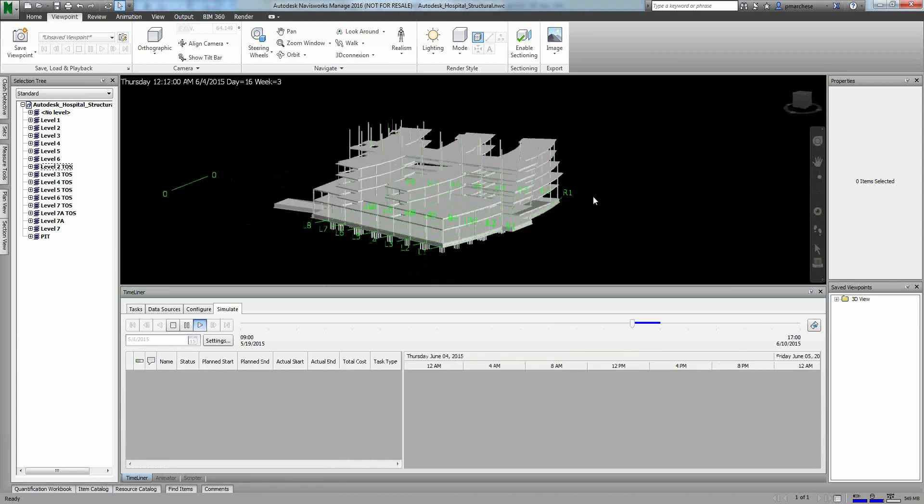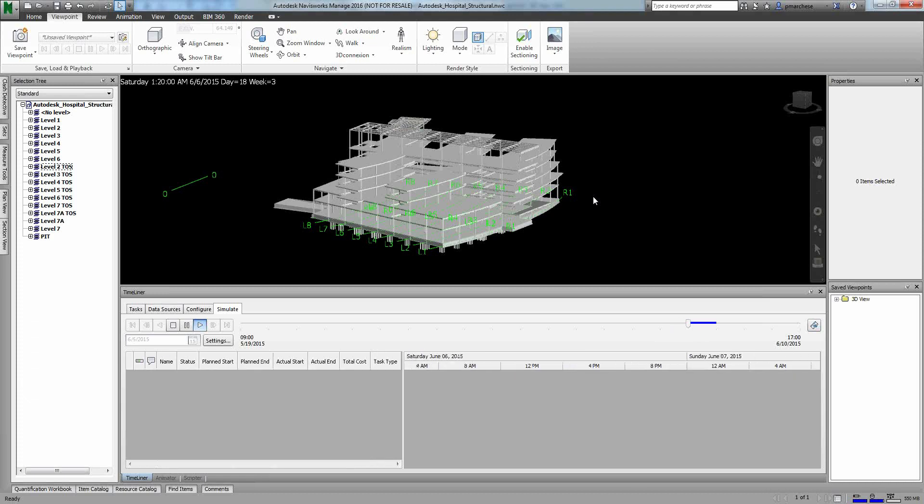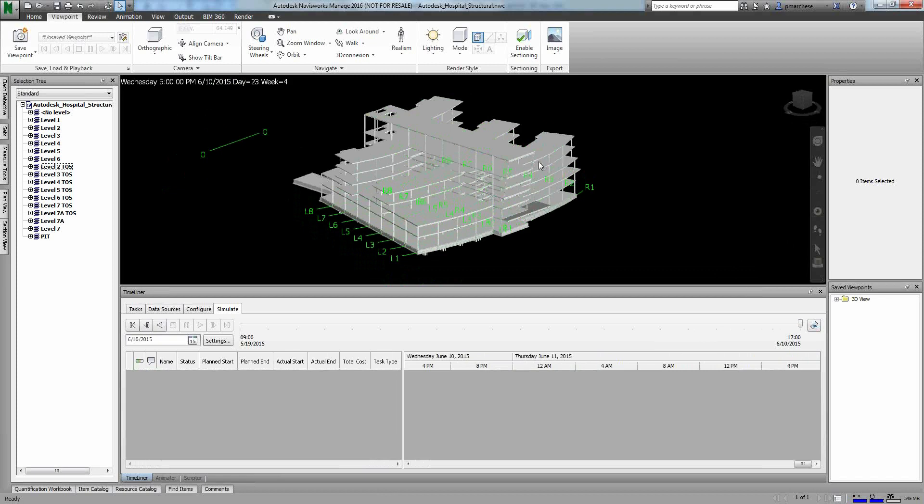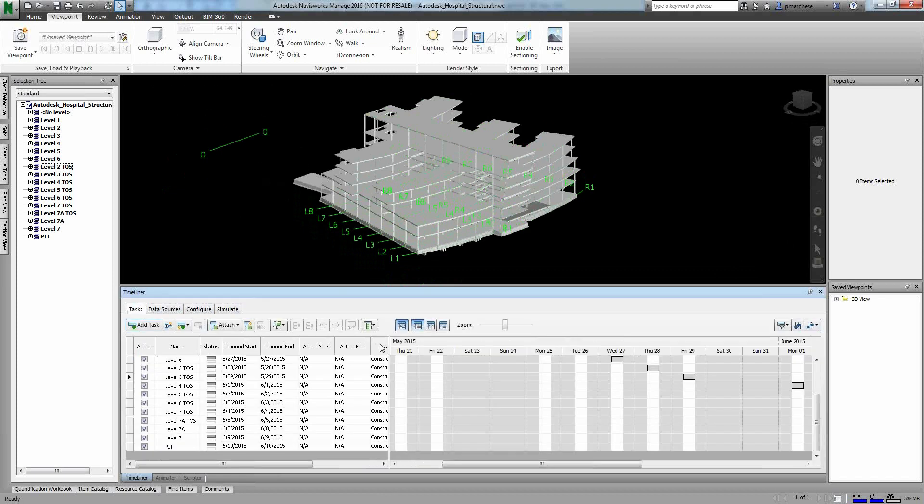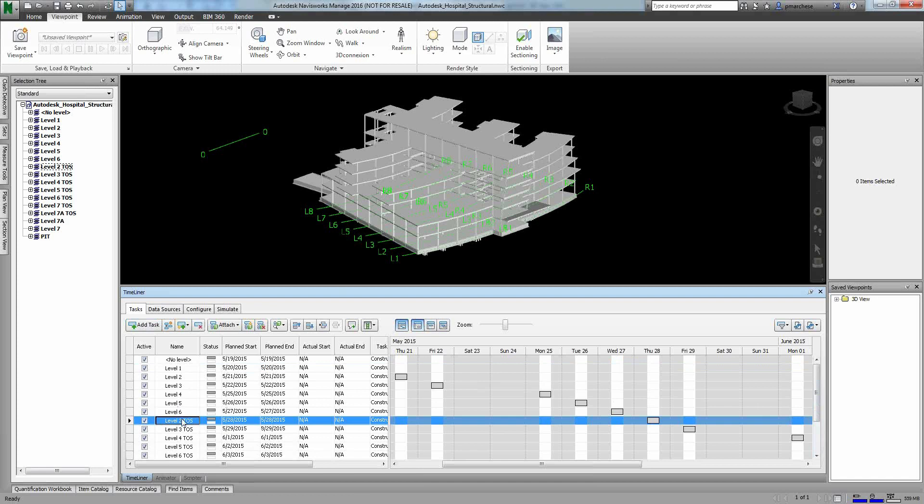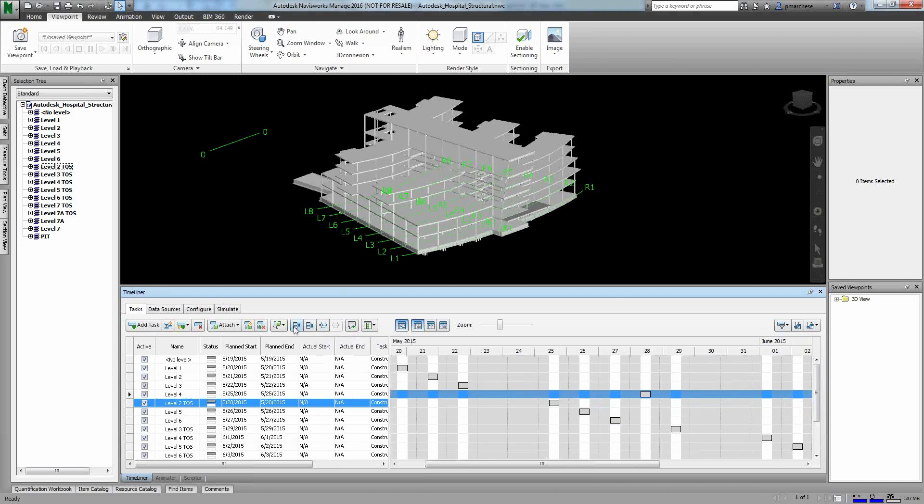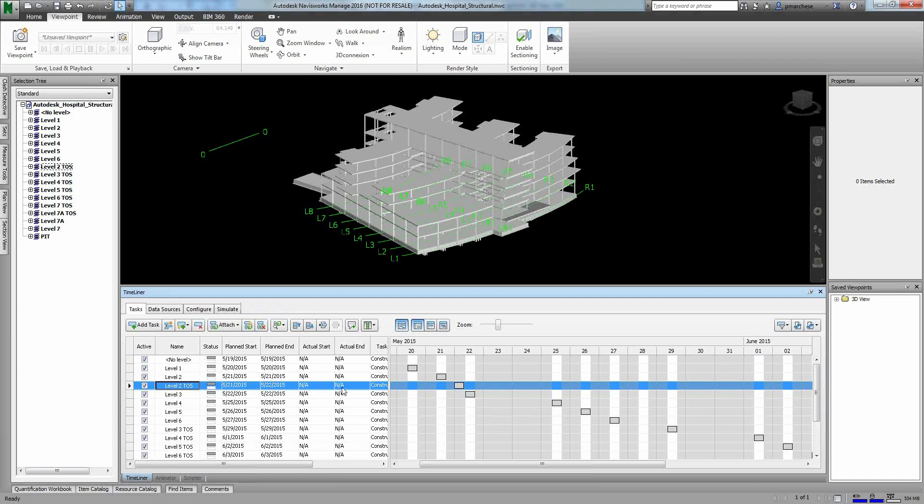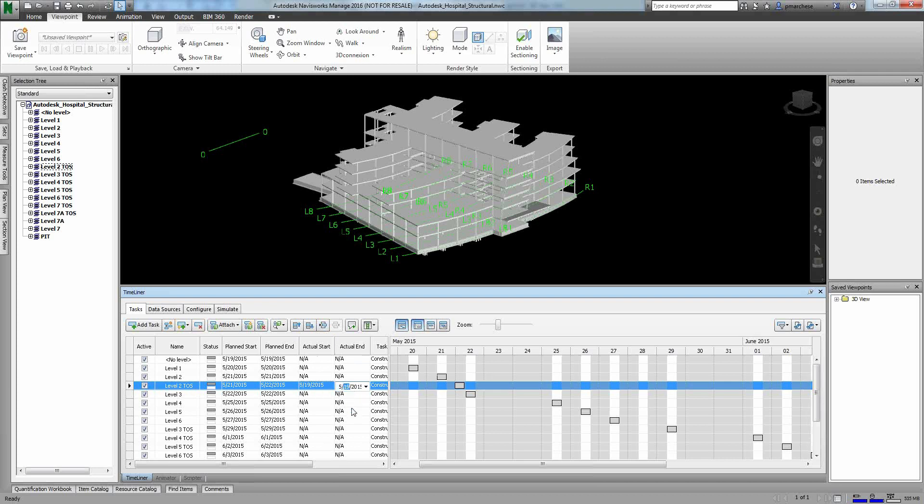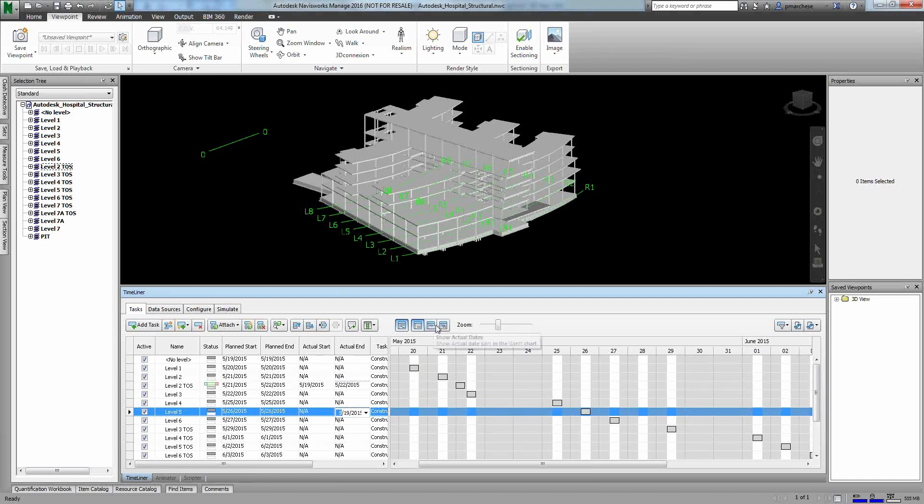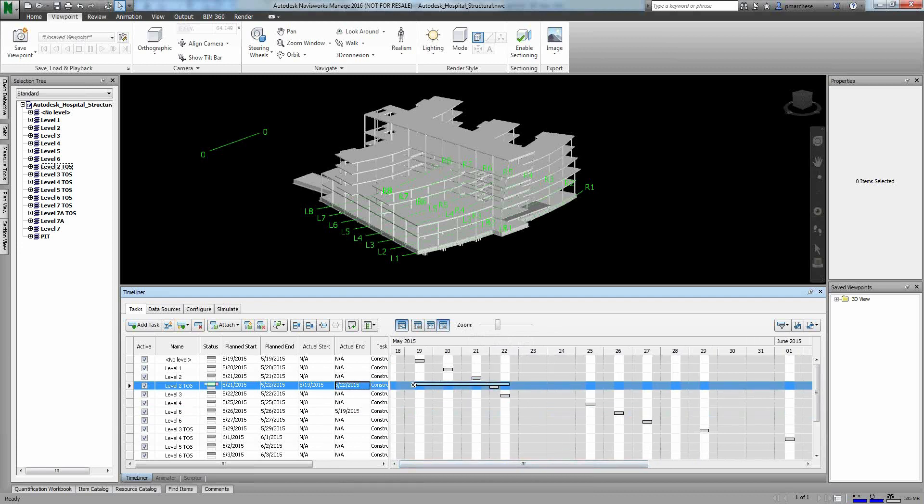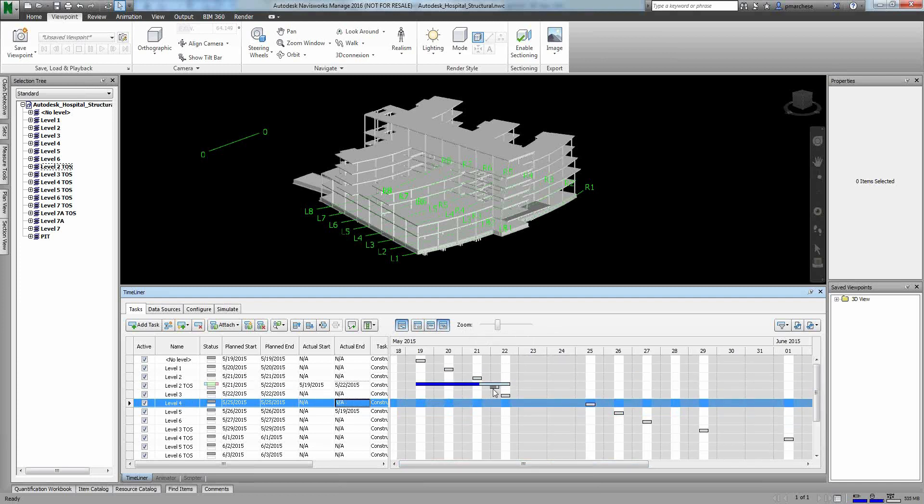Now, is this reality? Is this actually tying to a real project time frame? Not really, no. But if my goal is to actually just show a quick video of my building coming together, that's the easiest and fastest way to go about doing that. Now from here, what I can actually start to do is dial this in, make this more realistic. I can move things up and down, so that way my level two top of steel actually is maybe with level two. I can move things to be where I want them to be. If I want that to actually occur earlier, I can grab on this and physically shift this back and forth in terms of time. One of the things you'll notice is I'm looking at my planned dates. I have the ability to say when did the actual thing happen? Let's say that's going to be 519, so that actually started early and ended on time. Now I can actually show the planned versus actual. So graphically, I can come in here and see them. I can also come in here and edit them. I can see how things are doing in terms of schedule.